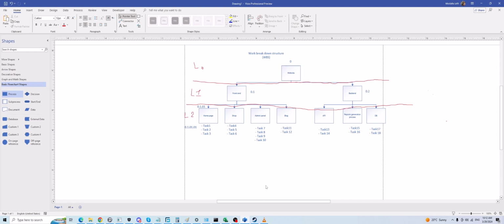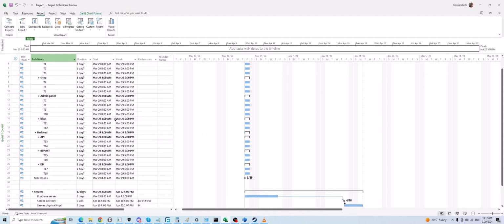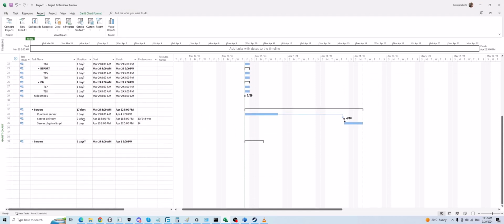And for these cases, you're going to use a milestone. So if a task is not under your control, if you do not need to control the resources for those tasks, then you use the milestone. Okay.